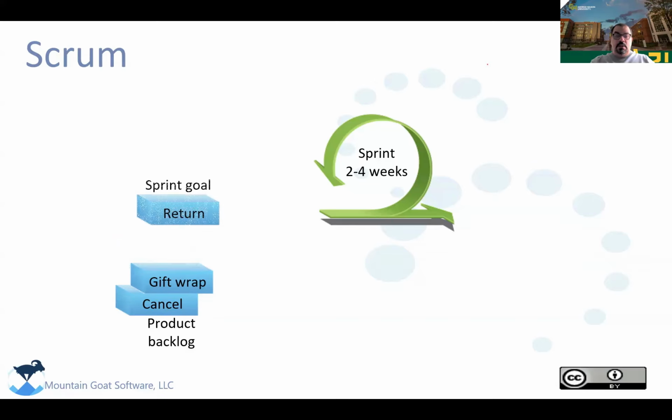You have the product backlog that has all the things that the system needs to do. For each sprint, you define one goal. What is the goal? It is the reason to develop that sprint. The goal is something that makes sense or makes value for the stakeholder. Think that your sprint is 2 weeks. During the next 2 weeks, how the team works to solve the goal is different than solving the tasks. You have several tasks, but it's to solve the goal.